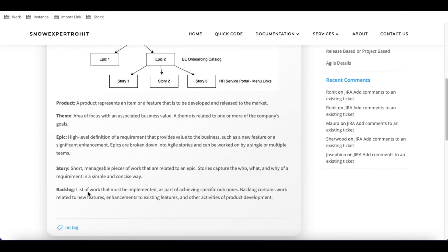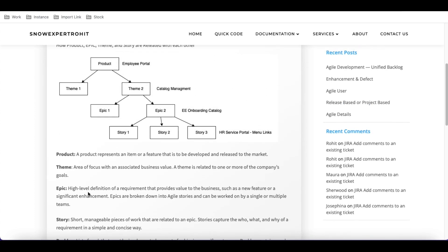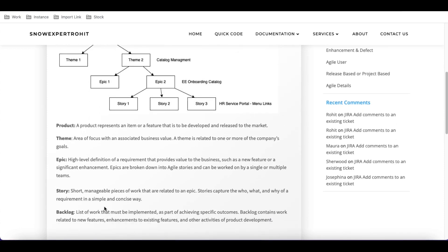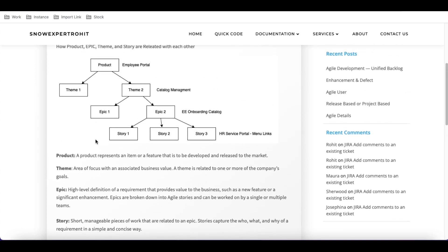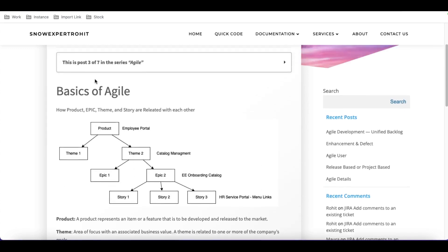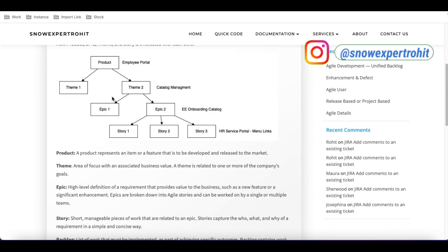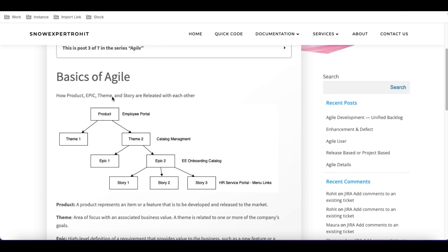Then we have the backlog. The backlog is simply the list of work that must be implemented. In the backlog there could be thousands of stories. Once we decide that a story needs to be built but haven't assigned it to a sprint or developer yet, it stays in the backlog. That's the overall Agile structure — how it looks and who manages each module. In the next video we'll discuss further. Thank you very much, have a great day.